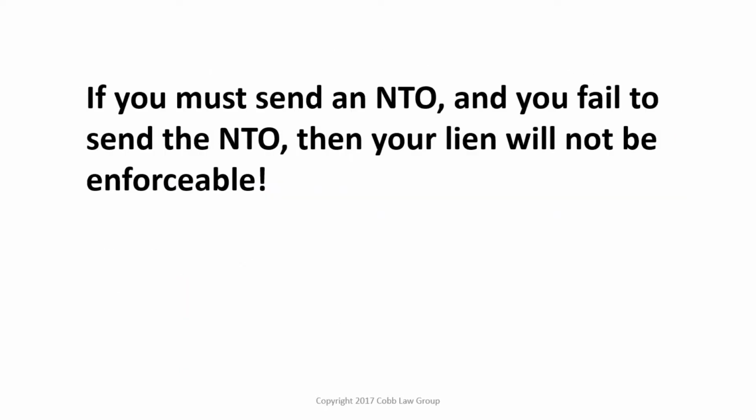If you must send an NTO, if the Georgia statutory notice scheme applies to you and you fail to send the NTO, then your lien will not be enforceable. The clerk may accept your lien, it may be filed, but it will not be enforceable. You will not be able to collect. And so it is very important when you first begin working on a Georgia project to understand whether or not you have to send an NTO.